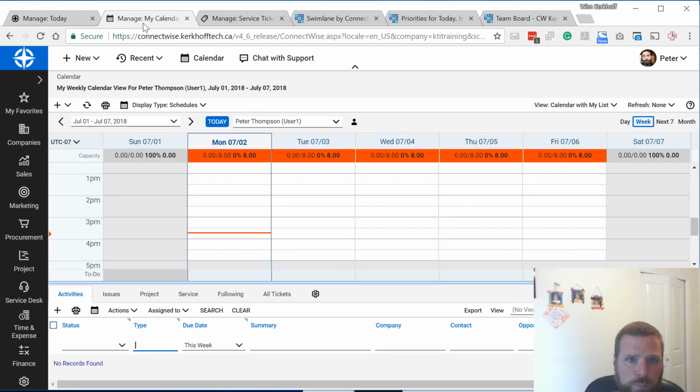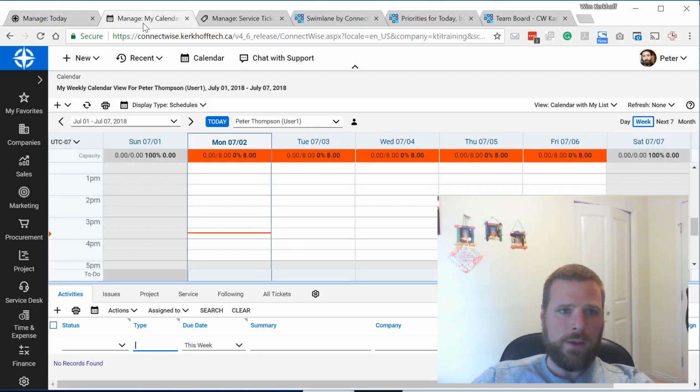The other way, which both ConnectWise and many consultants would recommend, is using the dispatch features with your calendar. So either having everyone schedule their own tickets, or their manager or a dispatch person. The problem with this is that a lot of waste is introduced, because when you don't complete it on time, you have to reschedule. Things get shuffled around and bumped every day. So this only works with a really good dispatch person and the process that they work from. And then when they're gone or they quit or they leave on vacation, then there's a big gap.